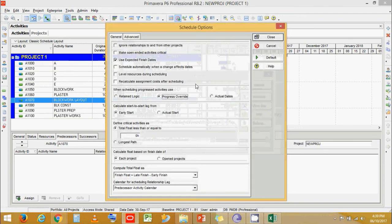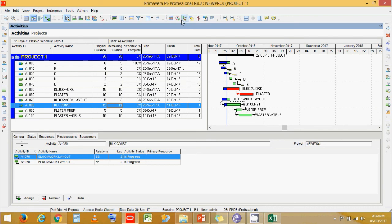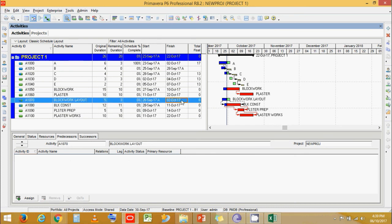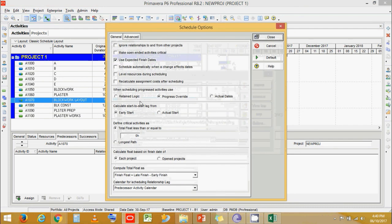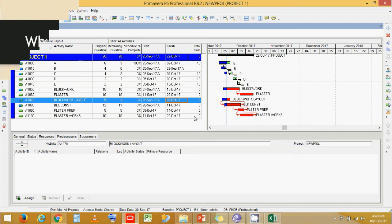Going back to Progress Override with Block Work Layout having two days remaining instead of three, and Block Work having 11 days instead of 10 — in Progress Override, Block Work Layout shows six days of total float while the remaining activities have zero total float, meaning Block Work Layout is not showing on the critical path. Switching to Retain Logic and scheduling, we see all activities now have zero total float because it calculates the longest path based on the predecessor activity which is still incomplete.